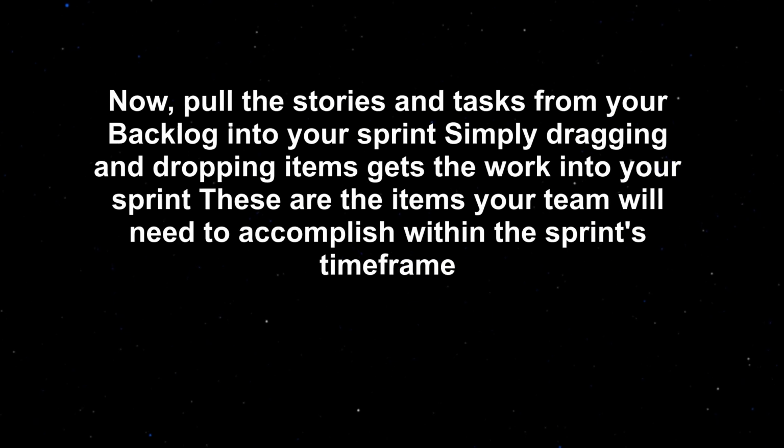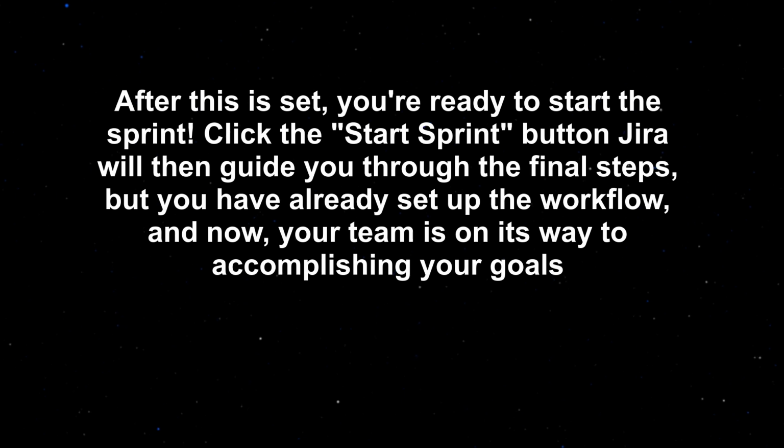Now, pull the stories and tasks from your backlog into your sprint. Simply dragging and dropping items gets the work into your sprint. These are the items your team will need to accomplish within the sprint's time frame. After this is set, you're ready to start the sprint.